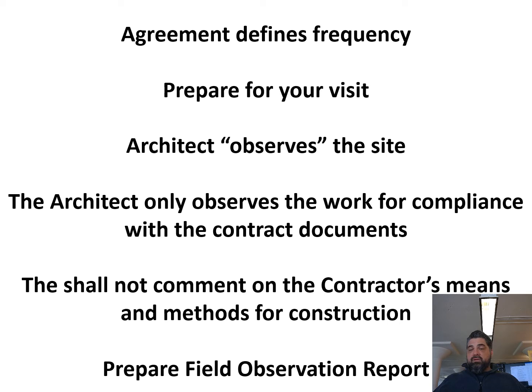And this is a contractual term, and it is a term that your E&O insurer and liability insurer will want you to use. You do not inspect the project site. You do not review the project site. You do not certify anything on the project site. You are observing.